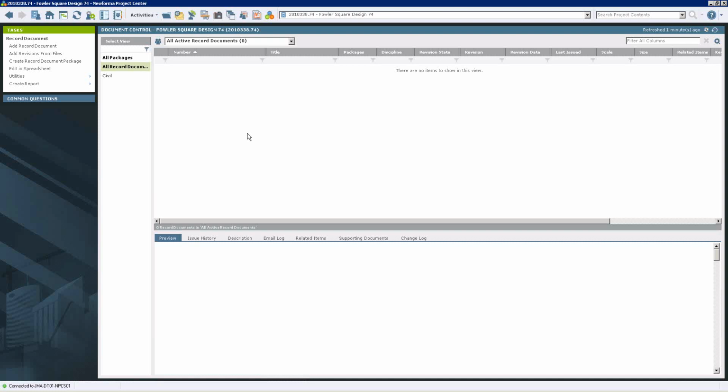And in the field, from that Plans app, in relation to a place on a drawing sheet, I can create punch list items, action items, or field notes, which roll back up into site visit reports. So again, that's the first step to get that going.